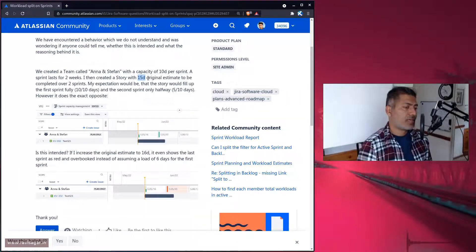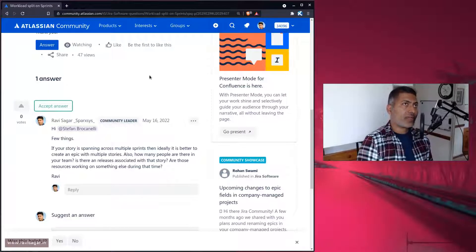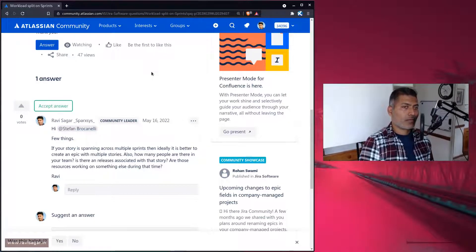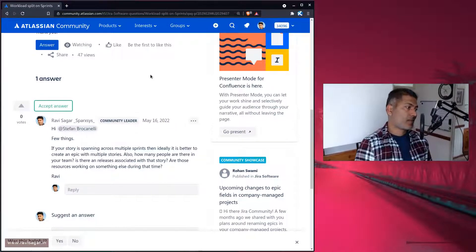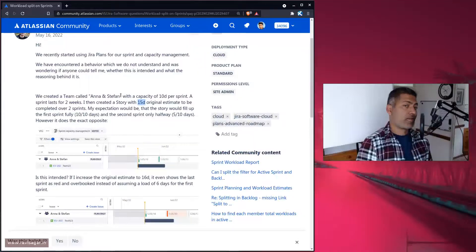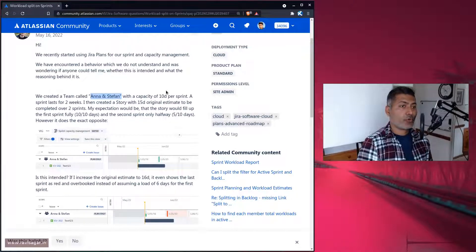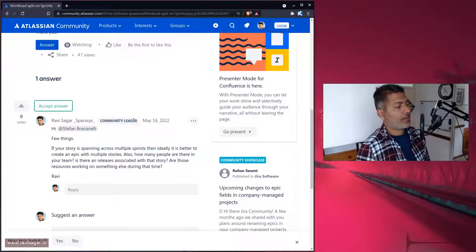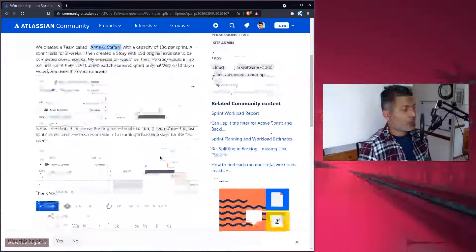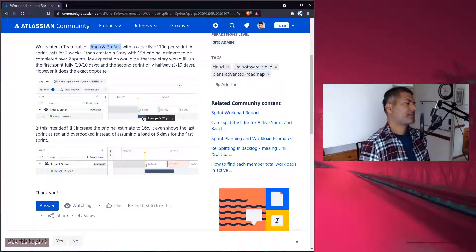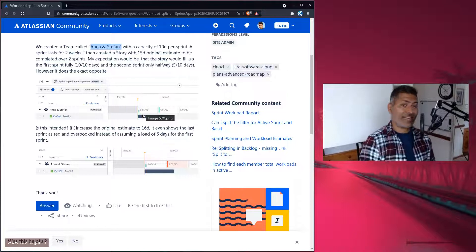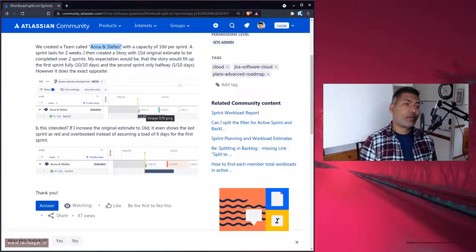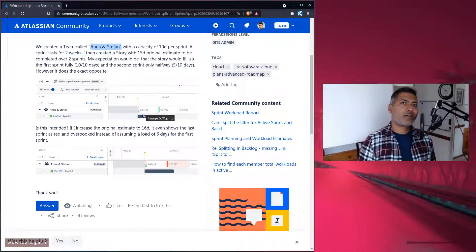When you're using advanced roadmaps, there are a few things you need to understand. Apart from breaking up your stories into multiple smaller stories under one epic, you should also understand if you have people under these teams — you can define the capacity of the team. But if those team members are already doing something else, or if there are some releases, sprints will have dates, and you can also associate your story to a fixed version with start or end dates.